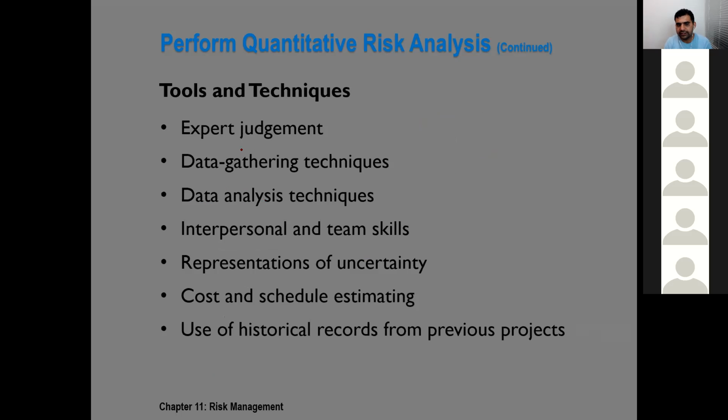We can use a variety of different techniques on quantitative risk analysis, including expert judgment, data gathering techniques, and I believe most of you are well aware what could be the different data gathering techniques, data analysis techniques, interpersonal and team skills, representation of uncertainty, cost and schedule estimates, and use of historical records from previous projects.